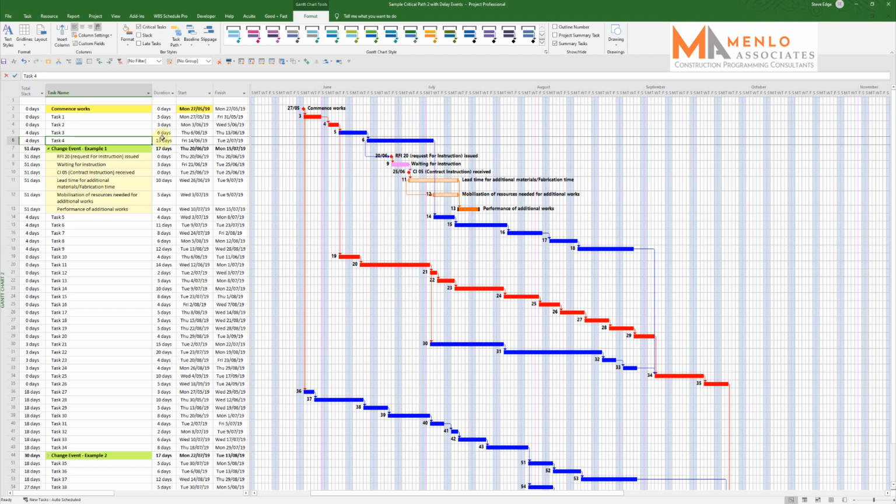Typically an event, if this was cut to fill across site and you discover, say, a soft spot. Now, the effect can either be that it will stop this job in its tracks and the problem will have to be fixed before you can carry on, or the job itself can carry on and the work will affect the later task.